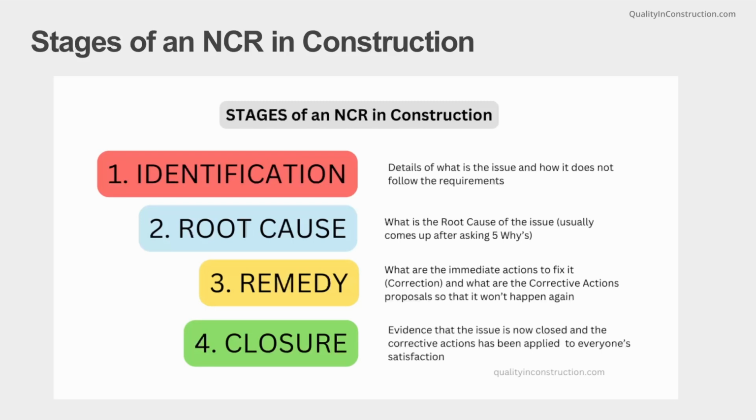Then there is the remedy. This is the stage where all the corrections and the corrective actions are proposed, approved and recorded before they are actually done. The difference between the correction and the corrective action is very important, as the correction is something that is applied to fix the issue, usually within a few hours or a few days, but the corrective action must be taken to avoid it from happening again in the future, which is also the most important part of an